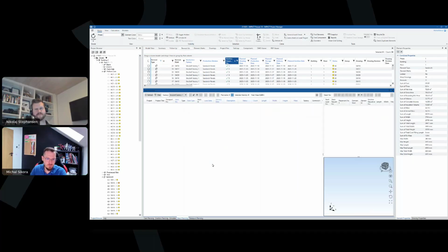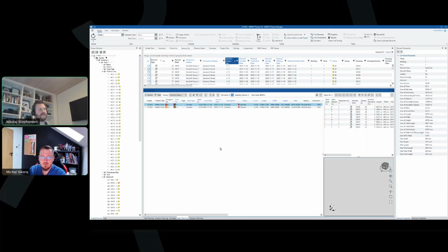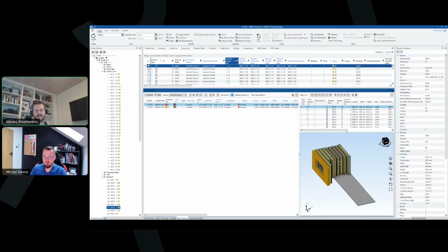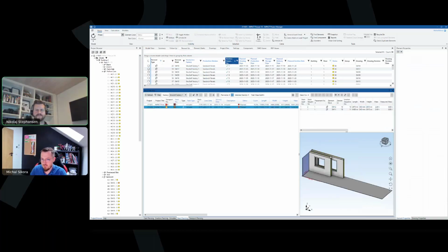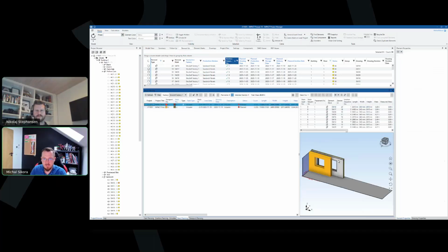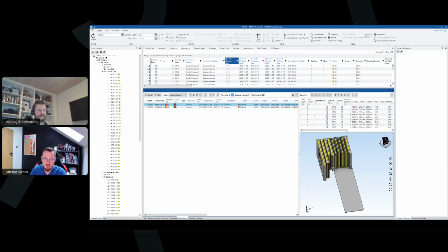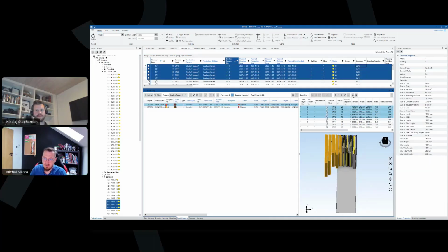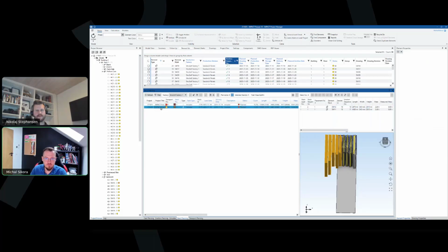So this all depends on your settings. Yeah, exactly. In our case here, I think these inloaders are not designed for these sandwich panels, because it says something about X amount of elements. You can see Michal is now doing the stack. You can put them on another inloader stack or on an A-frame or something like this. Exactly. I can remove those elements from that particular planning, or I can cut those elements out and click them one by one, 4 elements, preferably cut them, and then maybe paste them to another transport.